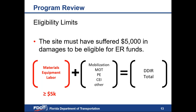Mahmoud Youssef clarified that when we say materials, equipment, and labor go into the $5,000 threshold, we're not saying that when you write the DDIR, you break it down that way. The pay items already include those payments — they're built in to include equipment and labor. So we don't expect local agencies to list individual items like tractor or laborer on the DDIR.